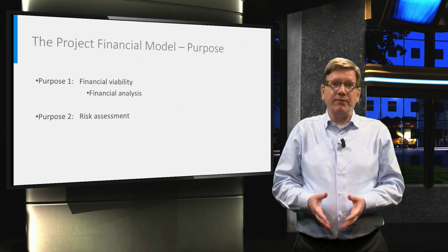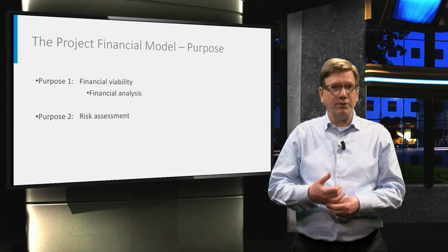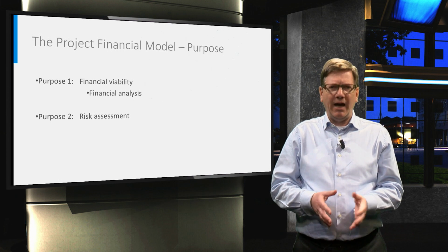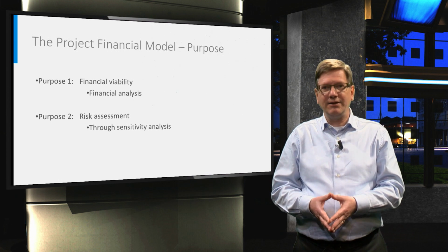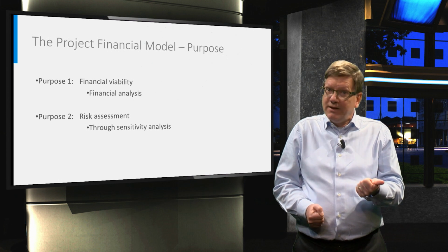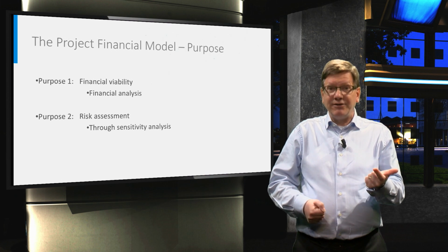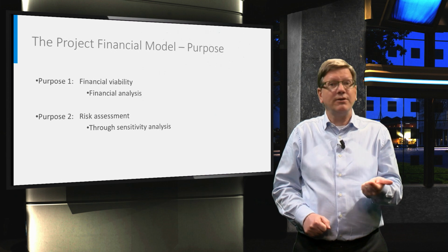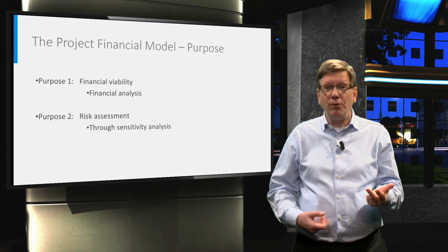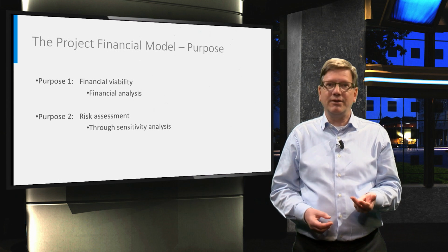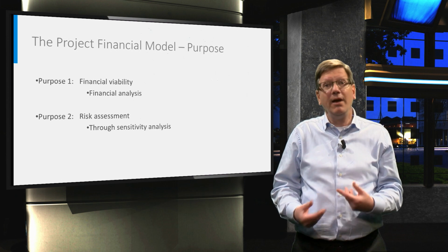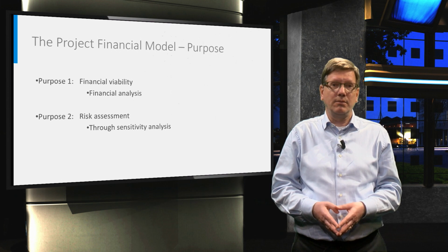An additional purpose of the model is that it enables stakeholders to analyze the impact of changes that could happen in the project. And this is called sensitivity analysis. Such analysis is important to determine the feasibility of the project, as a tool in the process of risk assessment and risk allocation, and because it's a useful tool in contract negotiations. Thanks to this analysis, we can determine what aspects are most important for us to achieve in our commercial negotiations.